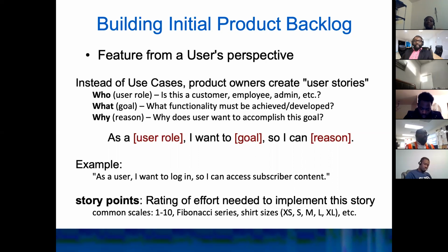Okay, and I was telling you yesterday when we spoke about capacity, estimating, and velocity, that every single story, after it gets refined, meaning we're adding more details into that story, we're adding acceptance criteria, because the story also has what we refer to as acceptance criteria, which helps the team make sure that those are the points that need to be built or fulfilled to deem a user story as done, aside from the definition of done, right?